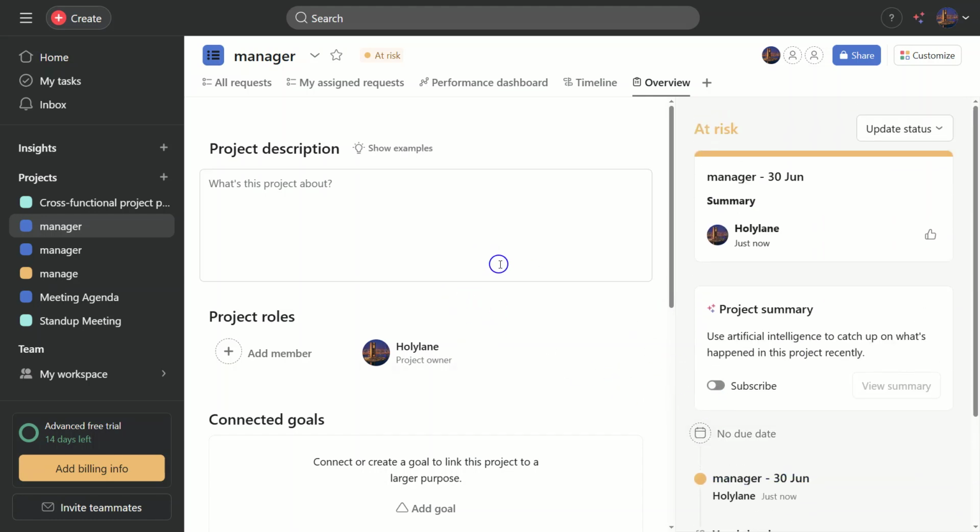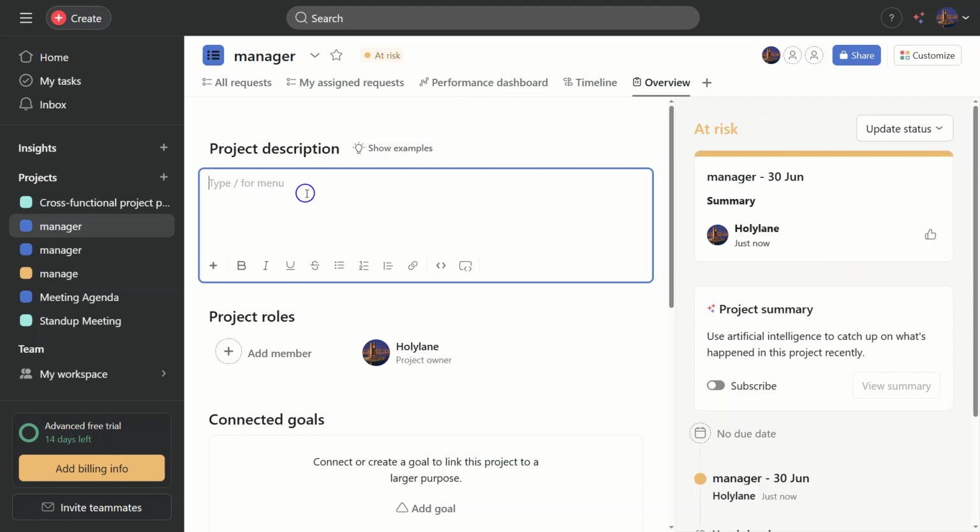After you've selected a color, it's time to write a brief summary. This should include what's been accomplished, what's next, and any obstacles your project is facing. This helps us because it provides context to the status color, offering a more in-depth look at the current project situation.